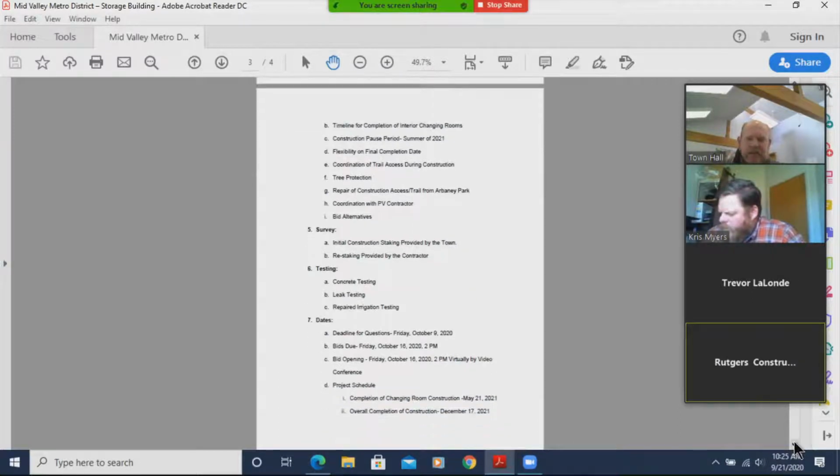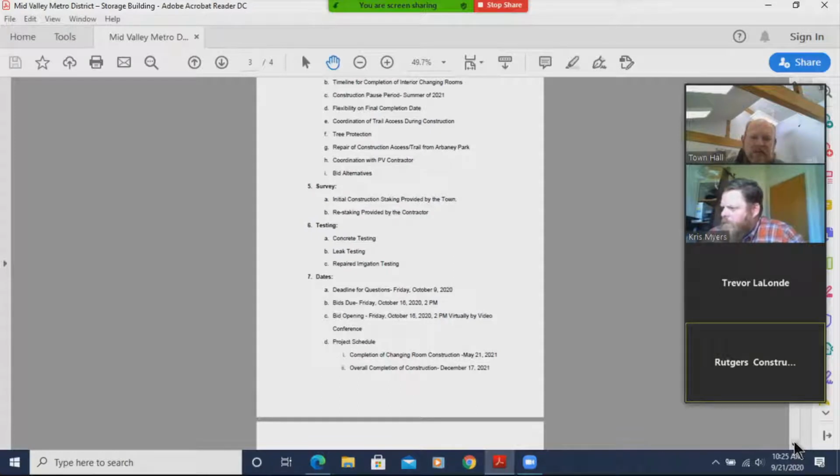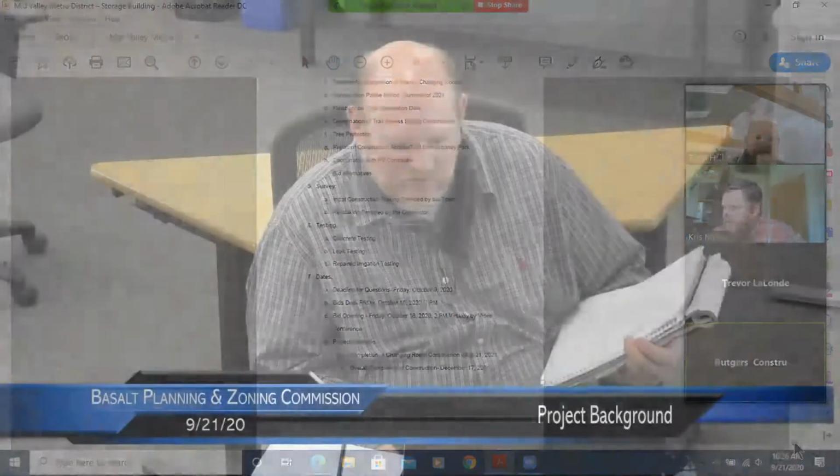And then moving back into the schedule, as I identified, the deadline for questions on the bids is Friday, October 9th. But we would encourage you, if you have questions, to get them in sooner. Questions are going to Lise Hoddle at the email address that's in the bid proposal. The bids would be due on Friday, October 16th at 2 p.m. And we'll be doing a bid opening on that day, via Zoom call. So if you provide a bid, we'll send you the Zoom information for the bid opening.